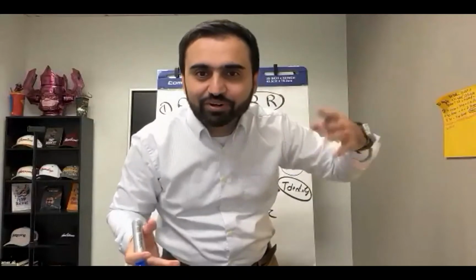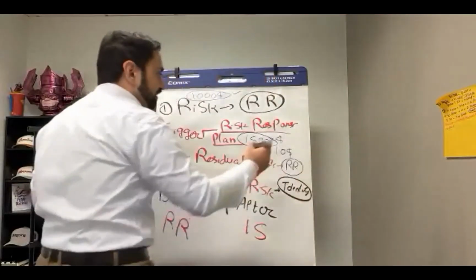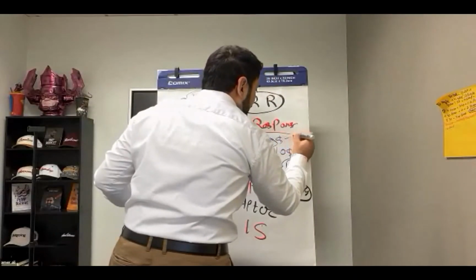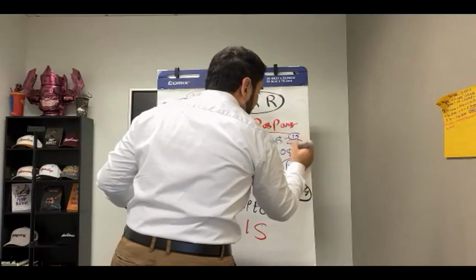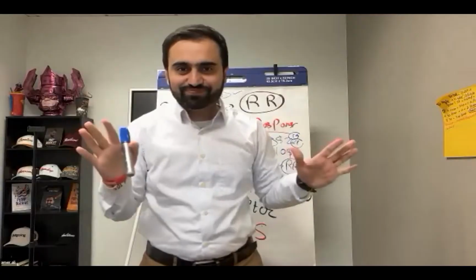Again, it is not planned. That 500 was not planned. For that, now I go to issue. Anything which is not planned goes to the issue log. I raise a change request and I work the sequence of issue. Make sense?